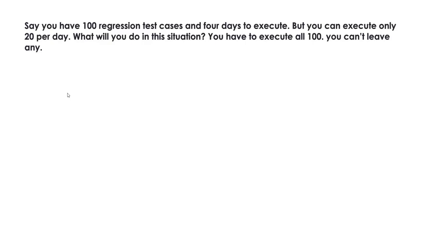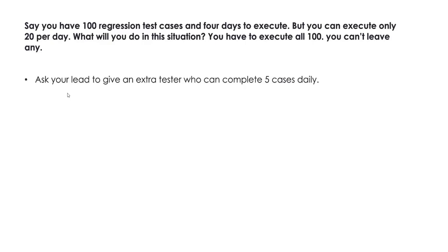Okay. There are a lot more test cases than whatever you can put effort into, right? So you can manage it by asking your lead to give an extra tester who can complete 5 test cases daily. So 5 test cases over 4 days would complete 20. So there are an extra 20 test cases. So you can ask the lead to provide you another resource so that you will be able to complete the task.